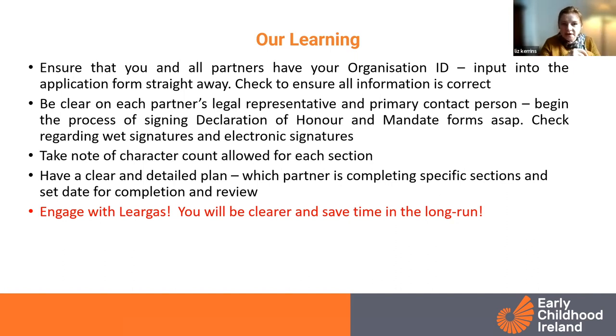Be clear on each partner's legal representative and primary contact person, and that's again about the paperwork in the online portal that you'll be applying through, to make sure that each partner's information is correct, that it tallies with what's on the portal and with the paperwork that you're putting in, because we have had that issue.